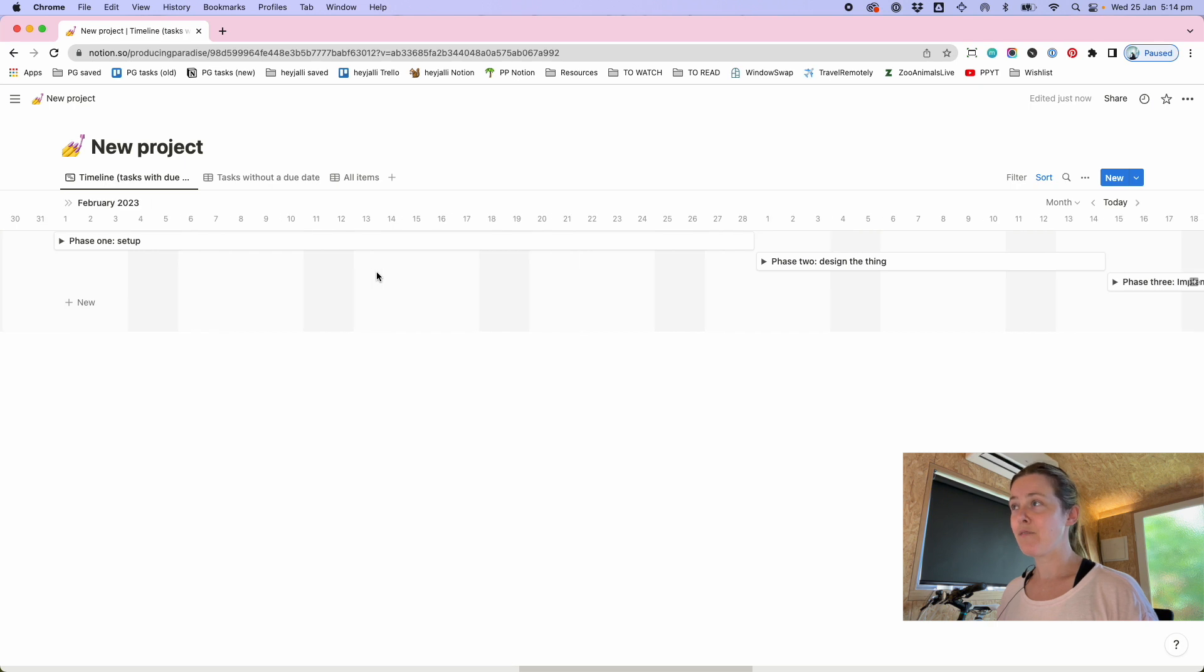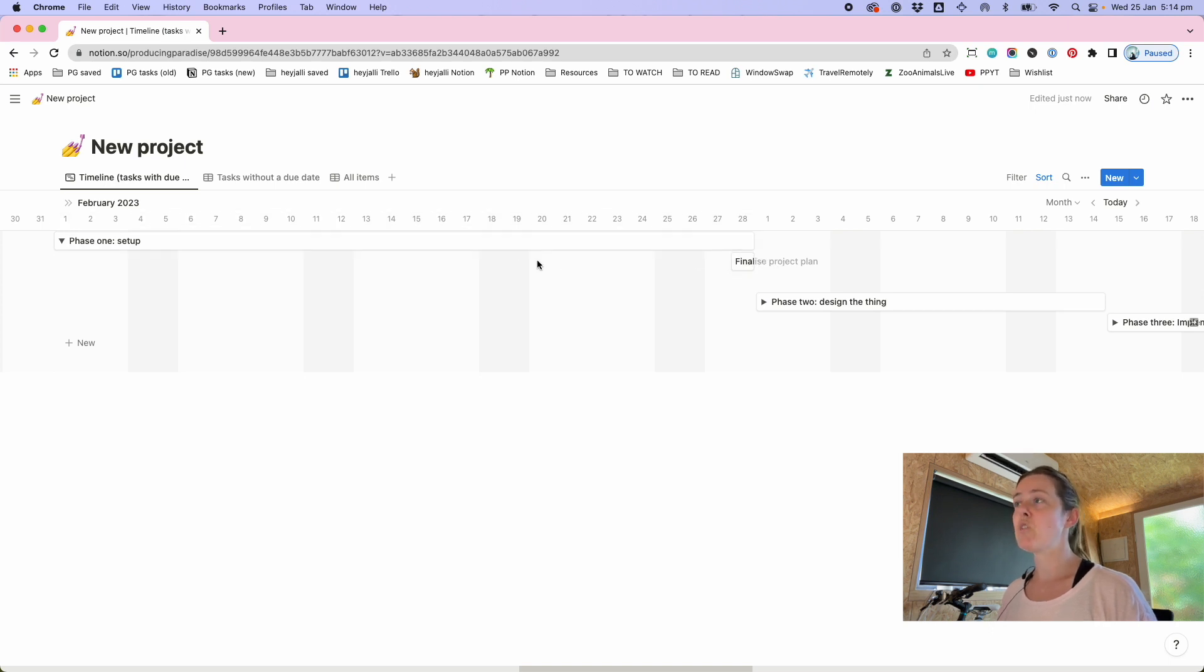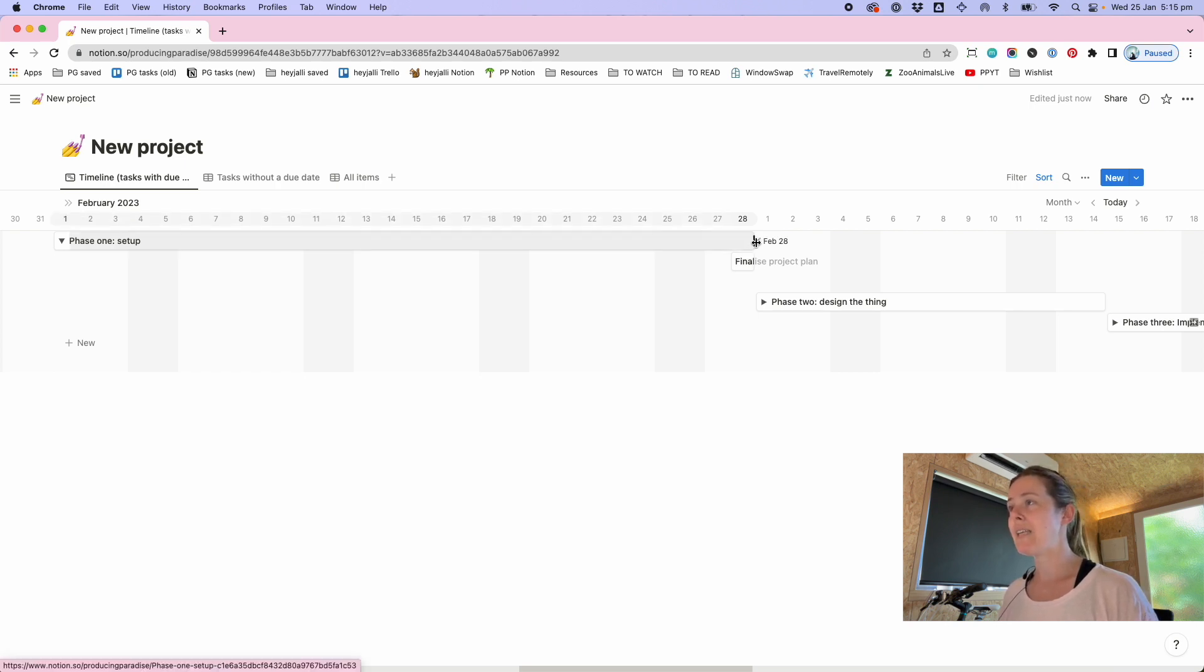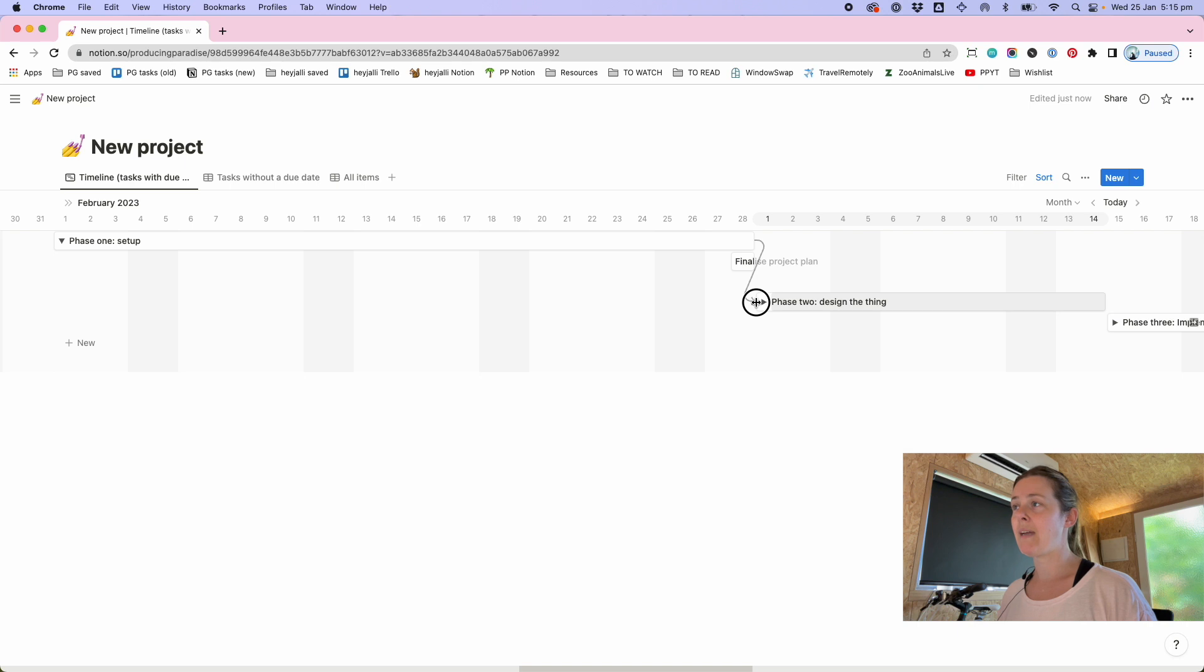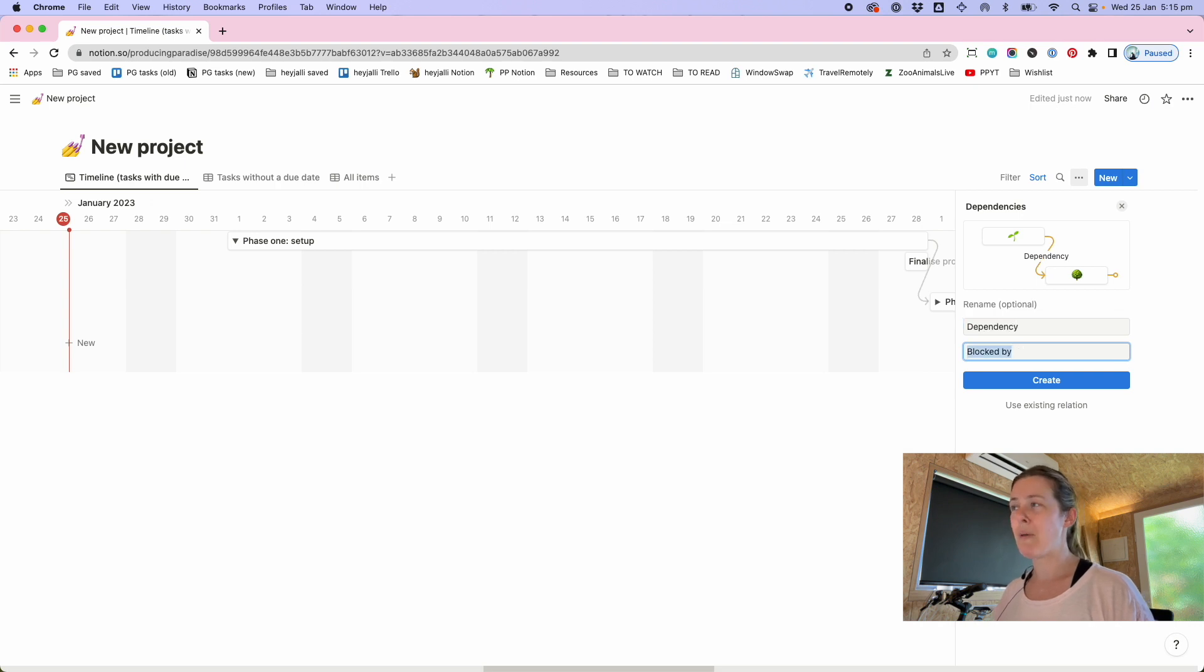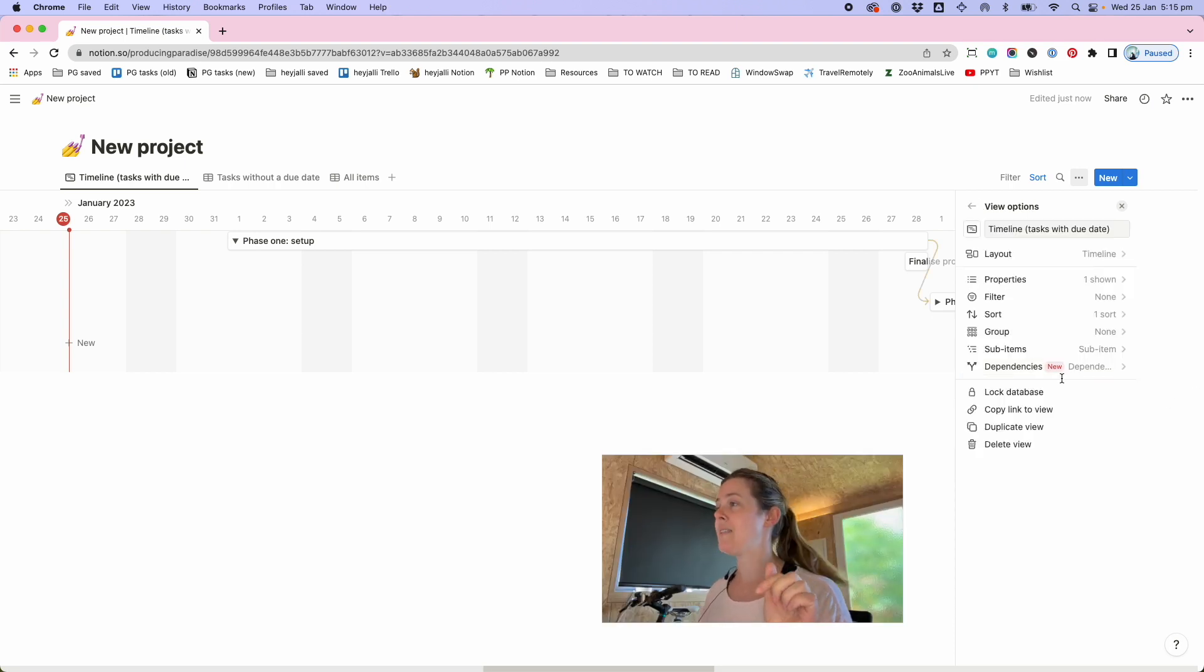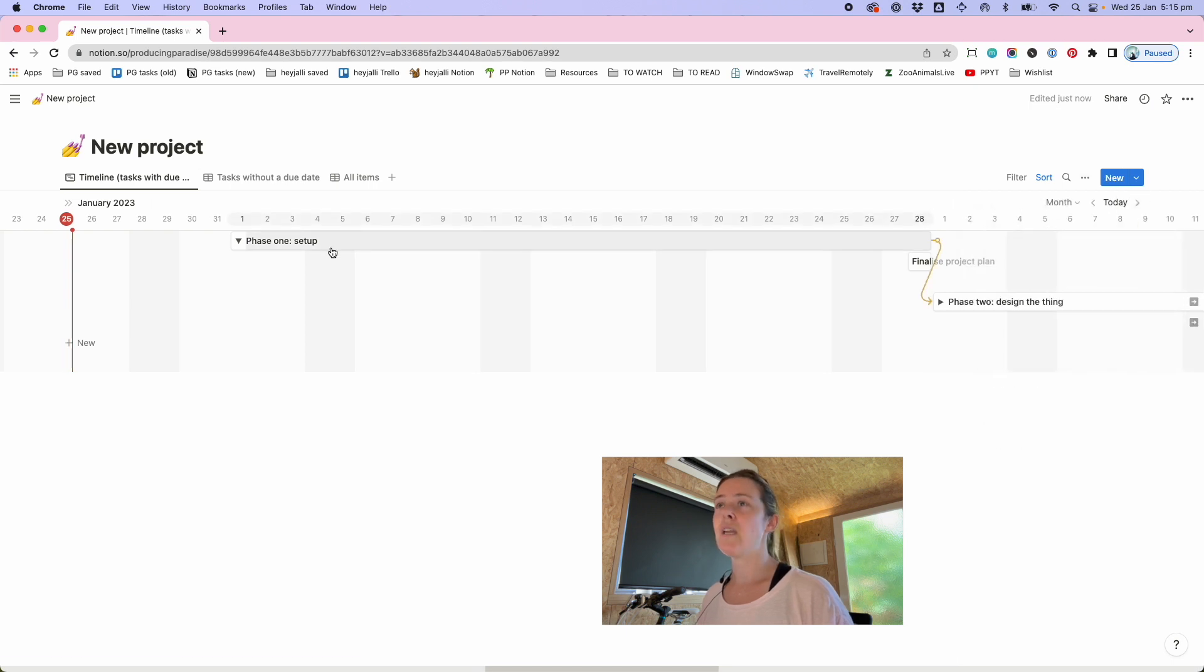Once you've got all of your tasks phases and subtasks set up now if I toggle here I can kind of see yep this project plan is part of this phase. To create a dependency I might want the phases to be dependent on each other so in that case I would want to take this little icon off the phase one set up block and click and drag to the phase that it's dependent on. I'm going to create a new relation and this is going to be I like to call it dependency rather than blocking just sounds friendlier and this is dependent on so it's going to say there's a dependency between these things and one is dependent on the other.